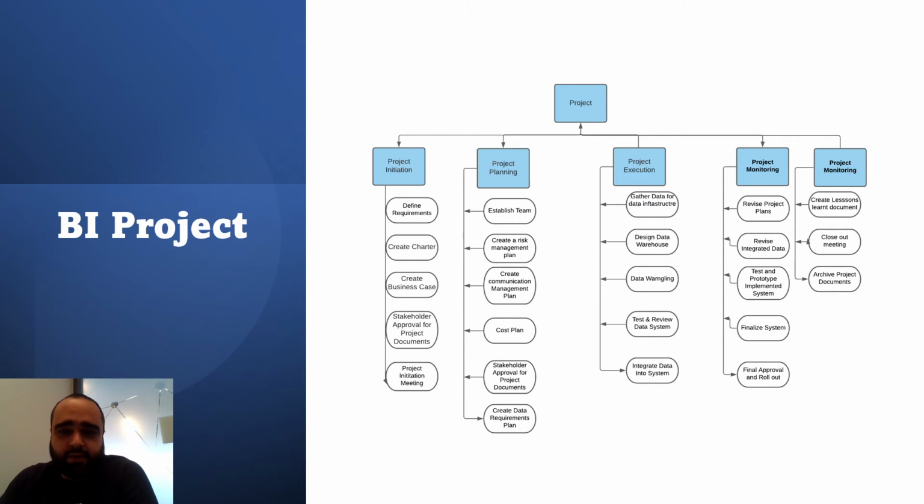So here is the detailed view of our work breakdown structure. We have identified each phase and we have created tasks associated to each phase. Each phase will also have different staff assigned to them. The project initiation phase will be assigned to the project manager and the business expert mostly. The requirements here are mainly around getting the project approved, understanding the requirements, and creating the charter.